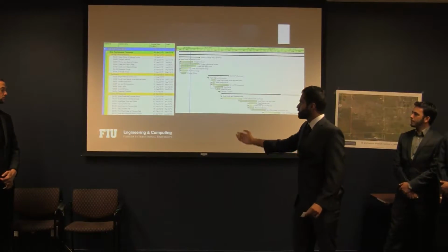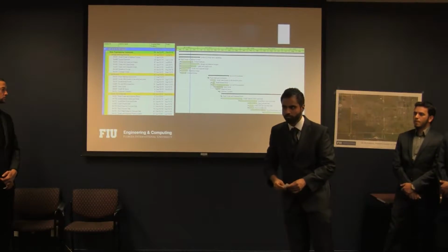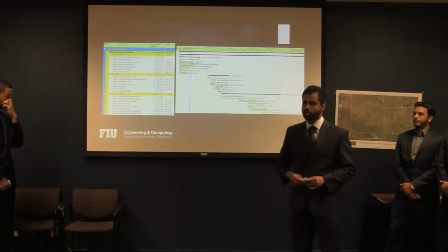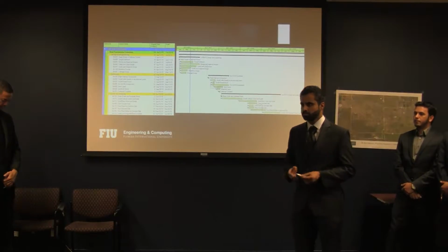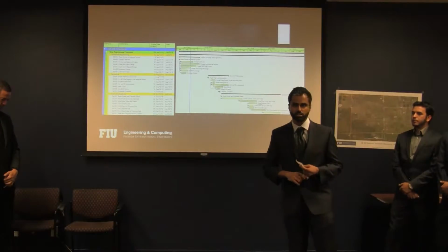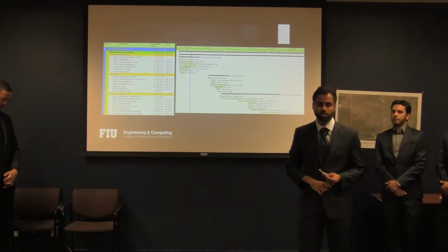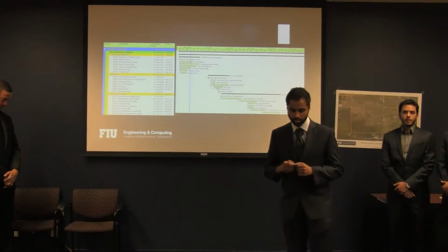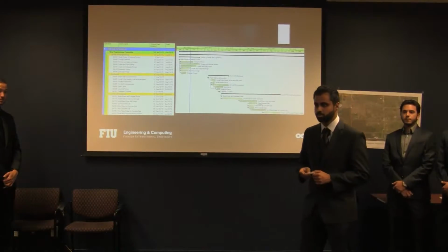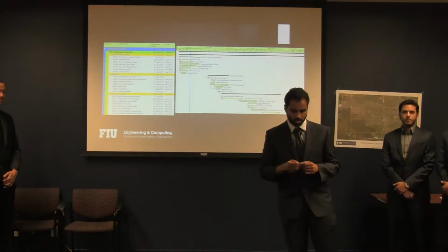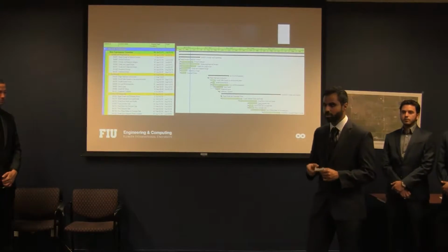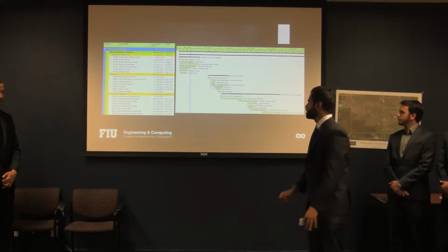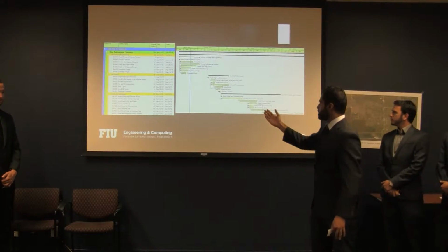The Earth network, which is the real work we're going to do for the project, is going to start about 5 months from today. Why do we have this 5 months? Basically, we need the mobilization to move all the equipment we need. We need the contractor to review our report and our plan. We need the inspection company to see our design, and we need the surveyor to look at the site and make sure everything is fine and we can do our project in that place.